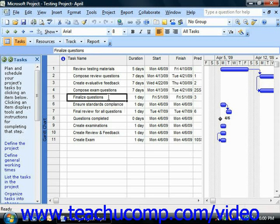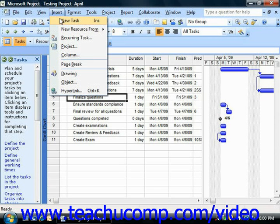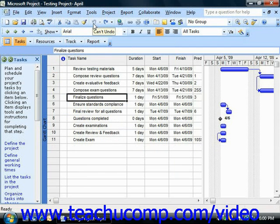Note that you may need to insert a new task above the first subtask within a phase in order to enter the title for your summary task or phase. To insert a new task above another task, just select the title of the task above which you would like to insert a new task, and then select either Insert from the menu bar and choose the New Task command, or just click the Insert button on your keyboard to insert a new task above your currently selected task within your list. You can then select the new blank task and enter the name of the phase or summary task into the new cell if needed.